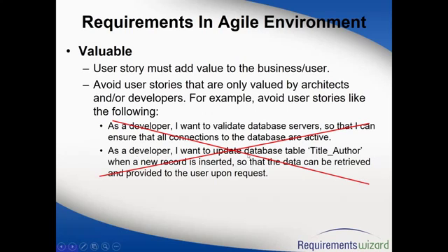As a developer, I want to update the database table when a new record is inserted so that the data can be retrieved. For the product owner, they really don't care what's in the database. All they care about is whether my system shows the name of that person or the name of that book or whatever it is. So never write a story from a developer's point of view. Always write a story from a user point of view. That's exactly why it's called a user story.